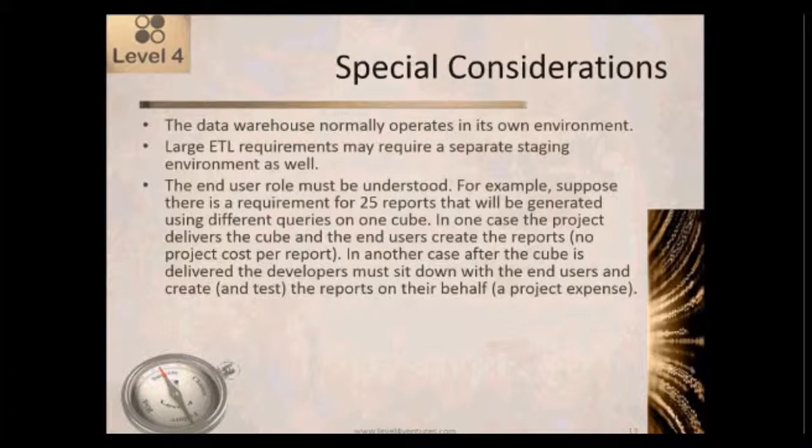All we're going to do is extract the data and put it into a database. So if you're doing this in a phased manner, that would be a logical first phase. And then once the data is all gathered together and understood, the end users can get in there, and as part of phase two, they can define what dashboards they want, what reports they want, what predictive models they want, and so on.